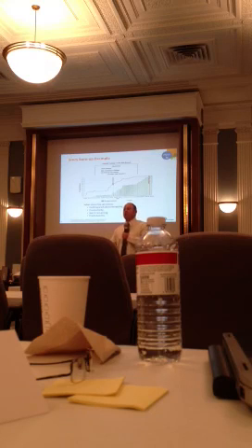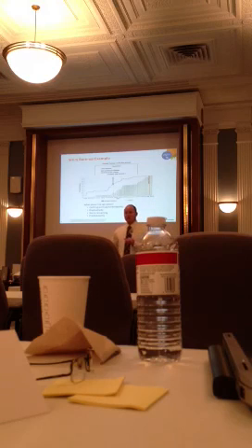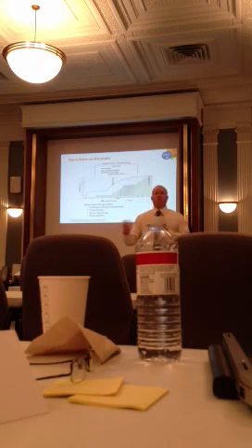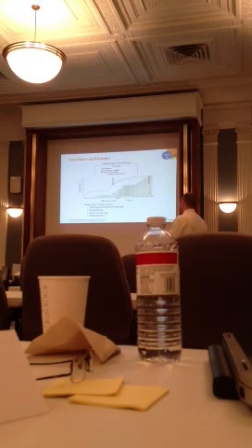But during this period of spiking, I didn't assign story points to it, because you don't really know how much effort is involved, or that you're going to find an answer. You're searching for answers, so it's hard to do a comparison. For a period of time, you have no input other than the research into resolving that problem, so we didn't churn out any story points. But then we came up with an answer, presented it back to them, and could move on. Make sense? Yeah. All right, then we continued to deliver.